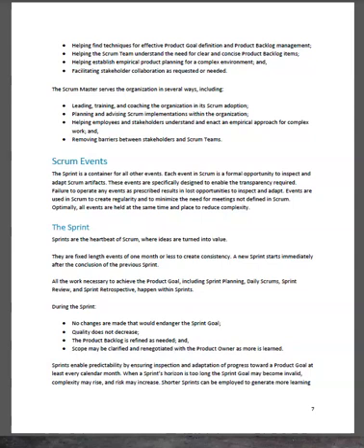The sprint. Sprints are the heartbeat of Scrum, where ideas are turned into value. They are fixed-length events of 1 month or less to create consistency. A new sprint starts immediately after the conclusion of the previous sprint. All the work necessary to achieve the product goal, including sprint planning, daily scrums, sprint reviews, and sprint retrospective, happens within sprints. During the sprint, no changes are made that would endanger the sprint goal.